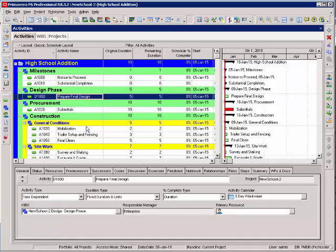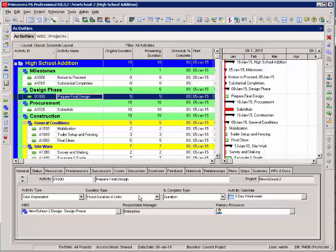If you're just building a schedule for construction, down in the details area, you'll want to keep fixed duration and units. This is the most common used duration type. I would be careful changing some of these settings for your activities.